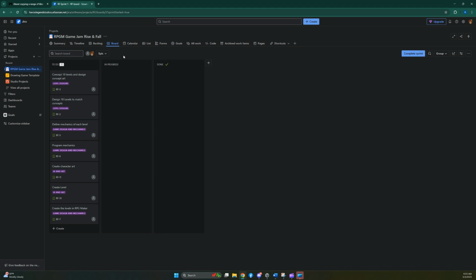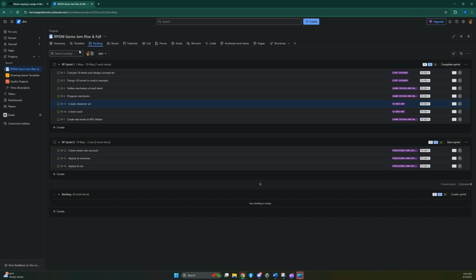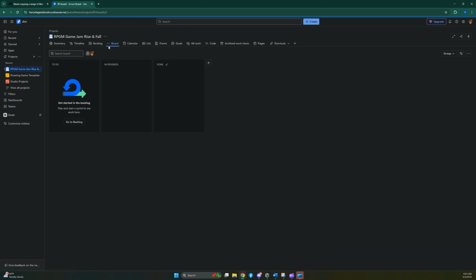So come the next sprint, what did you get done? What didn't you get done? You can always come back to your backlog or your timeline, add more items, move items from sprint to sprint. So when you're done, like say it's May 19th, you only finished 5 out of the 8 items here. And you know what? Let's move those items to the next sprint and continue them on. Or maybe you completed everything early. Let's add some more items from the next sprint. What else is there to do?